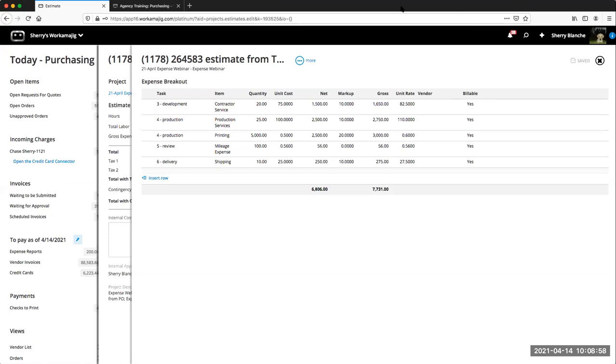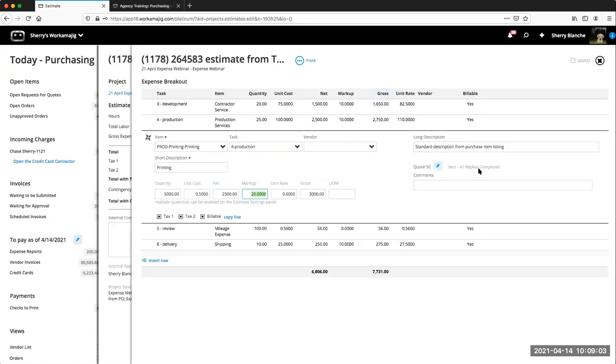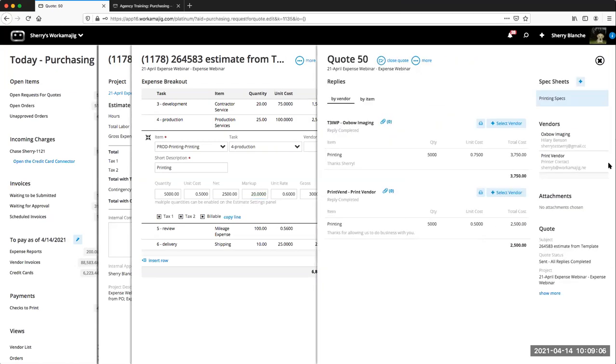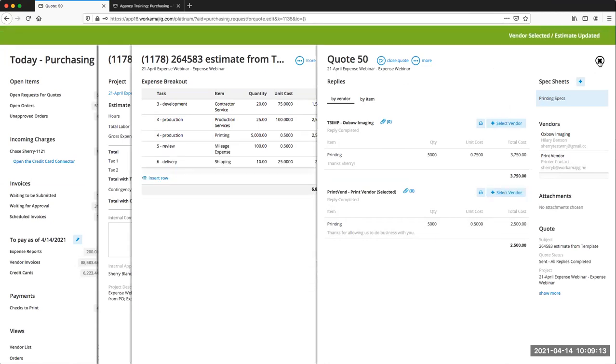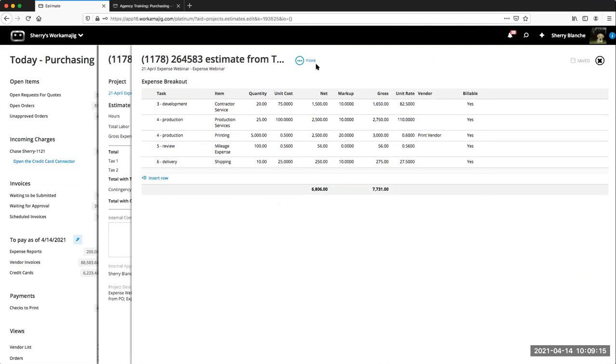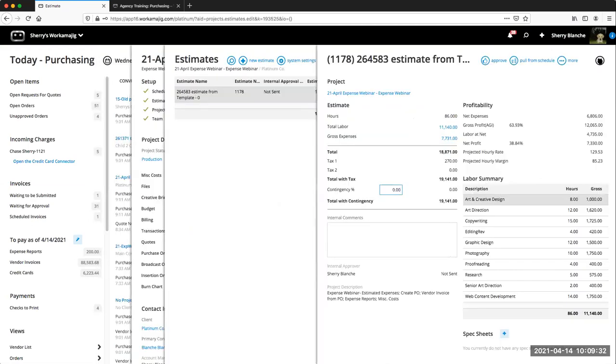And that is one nice automated system to quickly get bids and then even multiple quantities, and then you can get the replies and just simply update your estimate based on the information that they provide to you. So that's even before this estimate is approved. Now your estimates become your budget, and it is good also because then you can be tracking what did we estimate for these things in the project versus what did the actuals come in as. So same with the labor.